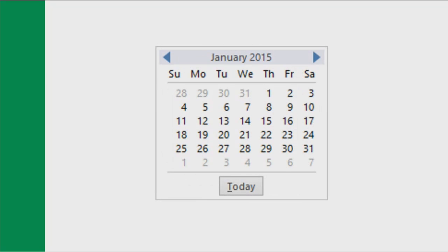The base calendars are the standard workday calendar, the night shift calendar, and the 24-hour calendar. You can use these calendars to define non-working days or times for the project. These are called exceptions. Some examples include special events for your organization, recurring holidays or other times off, and varied work times per week.